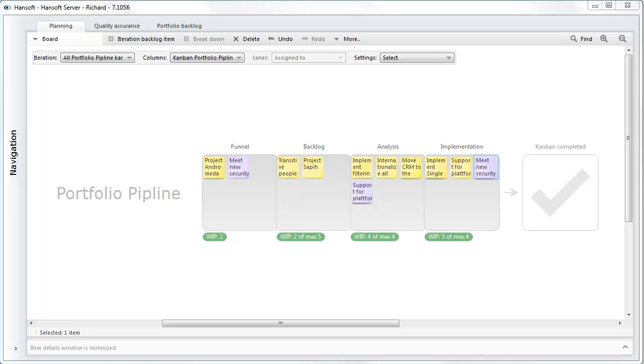So, Leffingwell talks about 3 levels in the Scaled Agile framework: the team level, program level, and the portfolio level. So the idea is that several teams are working jointly in a program, delivering to a common release schedule or release train. The work being executed within the program or within several programs originates from strategic investment decisions in the format of business epics or architectural epics that are being managed on a portfolio level. I will start guiding you through an example of the setup from the portfolio level.